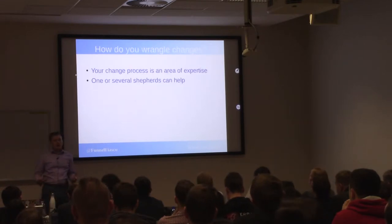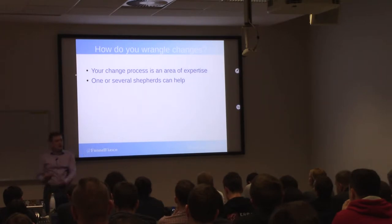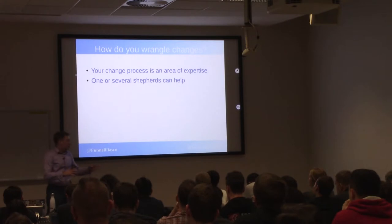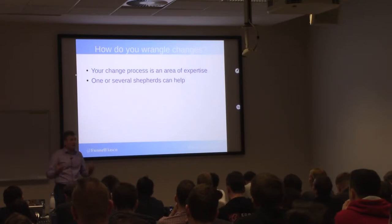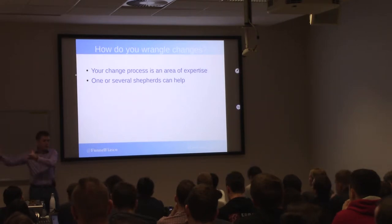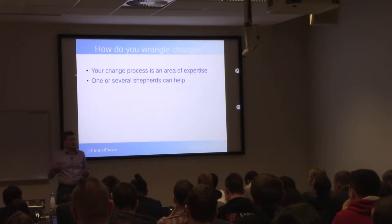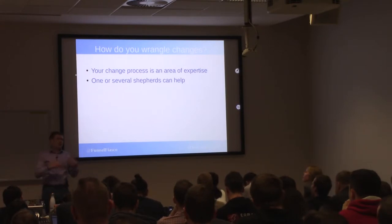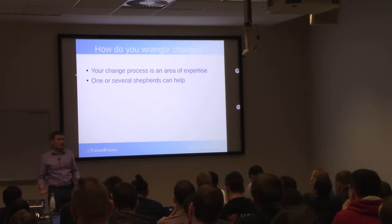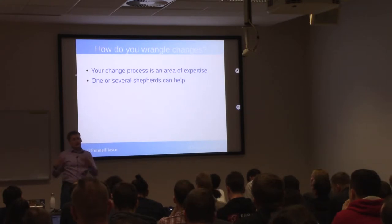You need to think about how you wrangle the changes. The change process itself is an area of expertise, just like writing code or designing artwork. It can be really helpful to have somebody who does that all the time. In Fedora, that's my job. People come up with the changes and I help them through the process, because if somebody's submitting a change once every couple of years, they're not going to remember the process and might do it wrong. So it's easier if there's somebody to guide it — one person, a couple of people, or a small team.